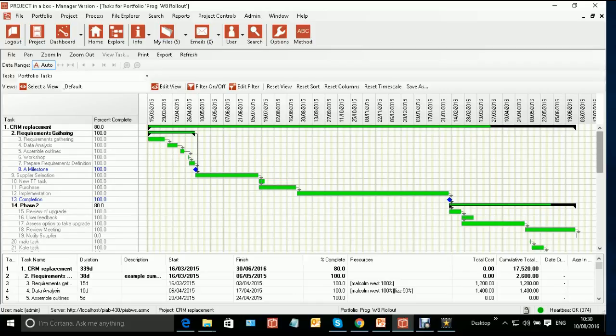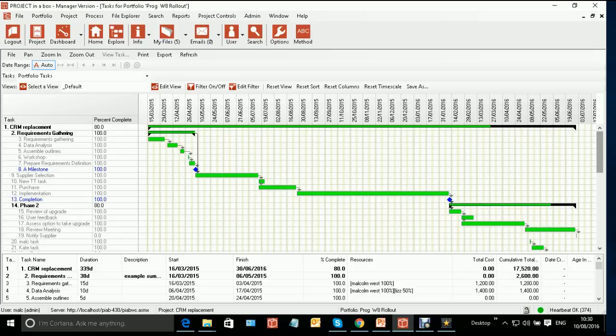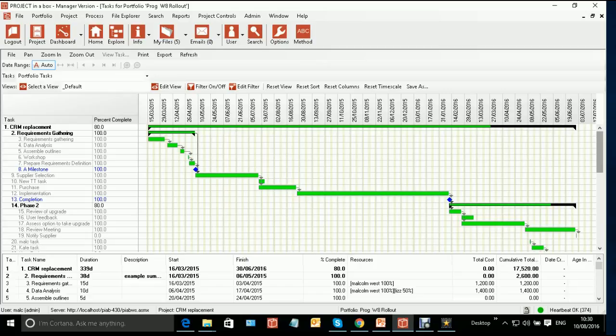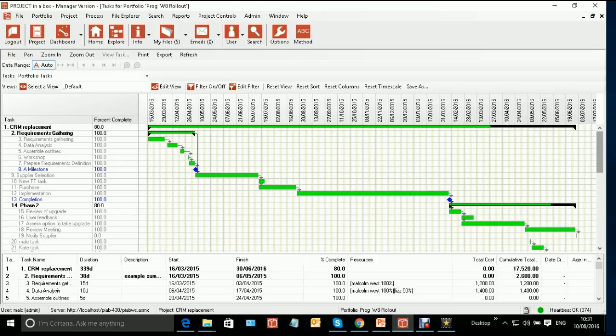Now, each plan is managed as a separate item. So as it always has been, the project has the plan as a file in it, and the project team might check it out and check it back in again. That might trigger then following on actions if there are dependencies to other following plans. So the project team sees the plan in entirely the same way as it always has done. The dependencies are managed by a higher permissioned user, an administrator, or that can be a delegated permission to other people. And there's some special forms for doing that.